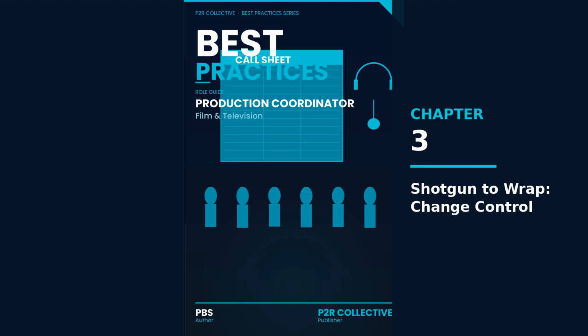Lock status rules for today: held, blocked, reshoot requested versus done. Verify receipt with a single reply: OK, from AD, locations, and owners who must act. Rerun the loop when you unhold or when the reshoot request becomes confirmed.